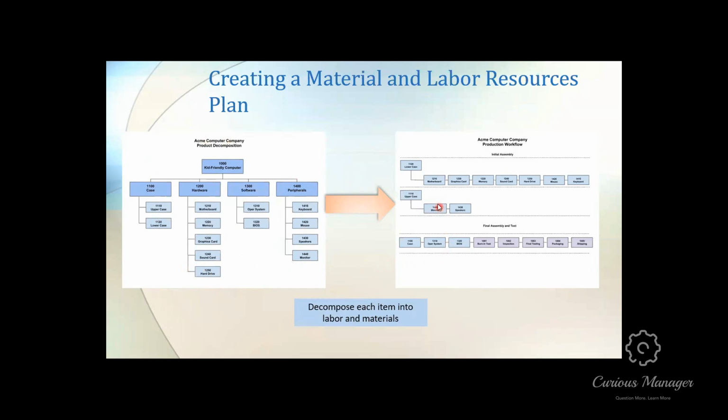So if you remember, we had our workflow, and this basically is how we can determine how the parts and labor are used to assemble this product. So for instance, what you could easily do is, let's say for 1210, you can make a swim lane diagram where each lane is a particular person who touches the product, and then you would have like 2 or 3 hours, whatever it is, and as it swims through the swim lane, you can move the product back and forth between labor. Then at the end, you could add up all the different hours that shows how much is used for each swim lane or each type of labor.